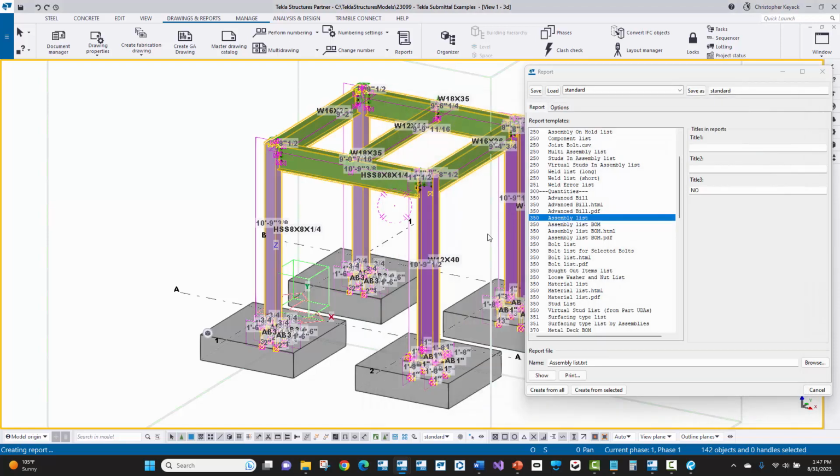I provide these additional reports so they can compare them against the Tekla PowerFab or the Tekla EPM import. They're just reports in human readable form, so the purchasing agent or whoever does the imports on the fabricator side can look at reports coming from Tekla and compare that to what they've imported into Tekla EPM to make sure that everything is properly coming across.